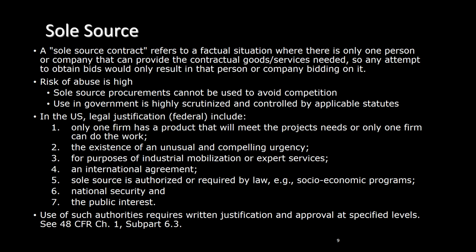On the other hand, they are often fraught with suspicion that the company used illegal or immoral means to exclude competitors, usually by cronyism or bribery. Hence, the risk of abuse is deemed to be high. In many cases, a sole source request may reflect personal preference rather than a true sole source. It is important to remember that sole source procurements cannot be used to avoid competition. Use in government is highly scrutinized and controlled by applicable statutes.